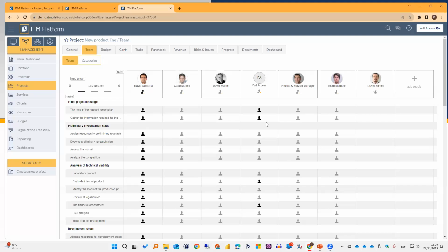So that is the first thing that I need to have in place: the assignment to tasks. Please note that summary tasks cannot be assigned. Summary tasks have just data. They will provide you with a summarization of the information below, like, for example, the total effort or the total progress, but you cannot assign a summary task. You can assign simple tasks.